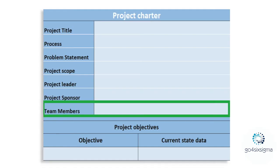The next part of the project charter is team members. Please decide who will be included in your team — who will support you, help you collect and analyze data. A team member might be someone who will be impacted by the change, someone involved in the process, or someone waiting for the results. Make sure those people are included, that you ask them if they want to be part of the project, define their roles, and confirm they are happy to be on the project charter.